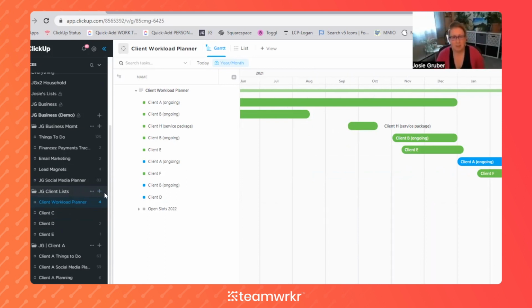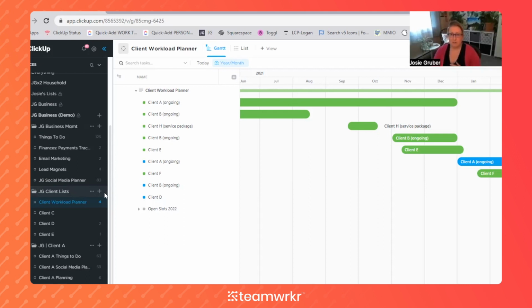I touched on it a little bit in last week's session, but basically it mostly has to do with project management, like the official project management strategy, and I'm not very well educated on that yet. So there's this idea of a sprint. Okay, this next sprint is going to be 2 weeks long and we want to get as much done as possible. And there's a way to set limits within that sprint period of that effort capacity. So if you use numbers 1 through 5, 5 is the most effort it takes to complete something and 1 is the least amount of effort,